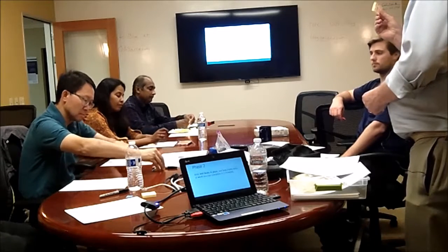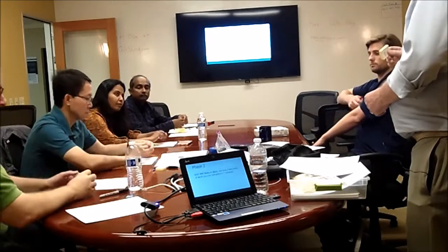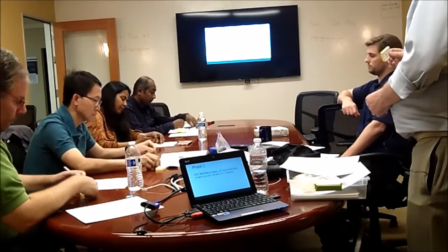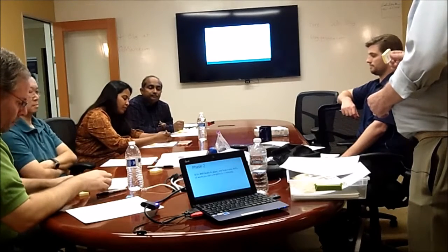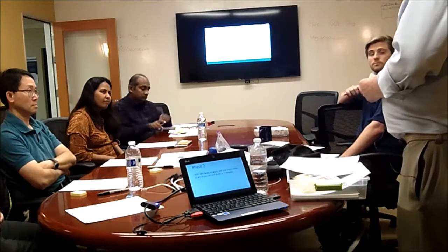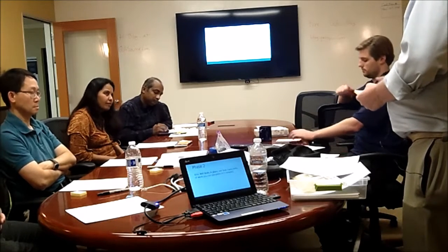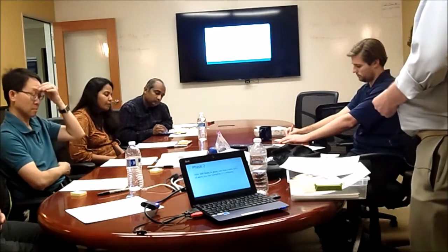Everybody that has a to-do and doing card, take another sticky, write the number 1 on it, put it up there. That's exactly right. You have just created a Kanban board. The basic difference between a Kanban board and a task board is that the Kanban board has WIP limits on it. In fact, you could put a WIP limit anywhere on this board, and that would technically be a Kanban board.